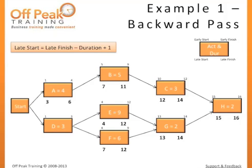Now we have to find the late finish of D. This can be tricky since it has two successors. Task F can start no later than day 7, and Task E can start no later than day 4. Since we do not want to delay the project, we will have to finish D before both of these dates. Therefore, the latest we can finish D will be the end of the third day, so neither the late start for E nor F will be affected. Using our formula, 3 minus 3 plus 1, gives a late start of 1.